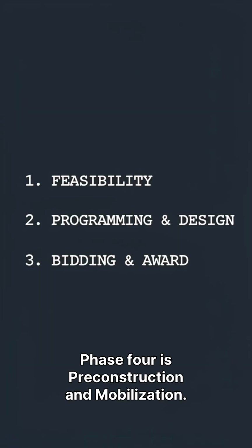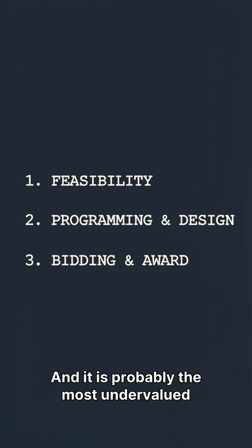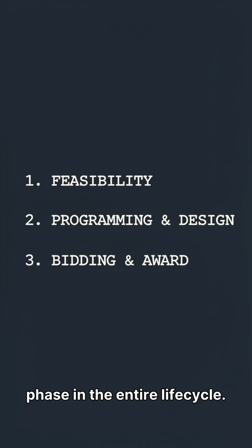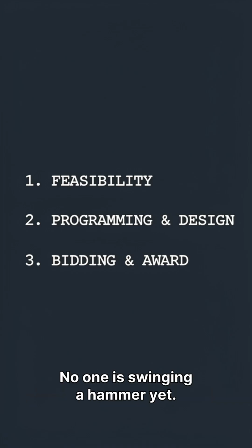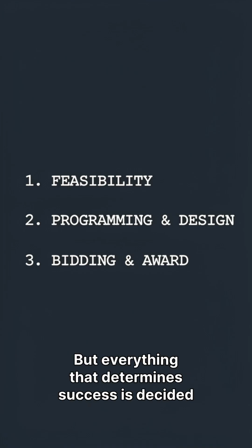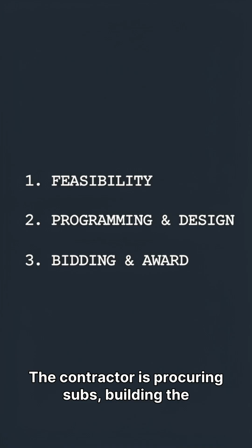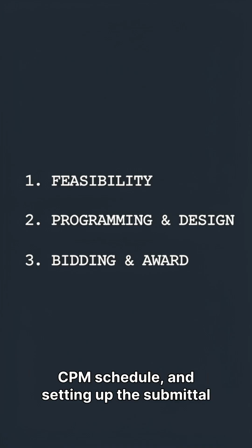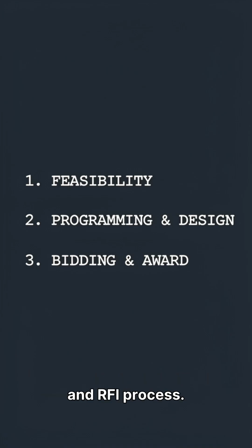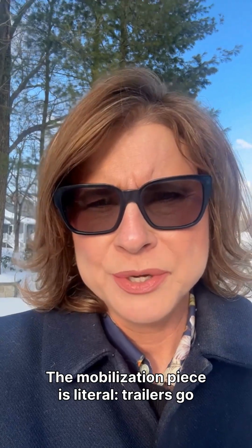Phase 4 is pre-construction and mobilization, and it is probably the most undervalued phase in the entire life cycle. No one is swinging a hammer yet. But everything that determines success is decided now. The contractor is procuring subs, building the CPM schedule, and setting up the submittal and RFI process. The mobilization piece is literal. Trailers go up, fencing goes up, temporary power gets connected. The outcome is a project resourced and ready to build.